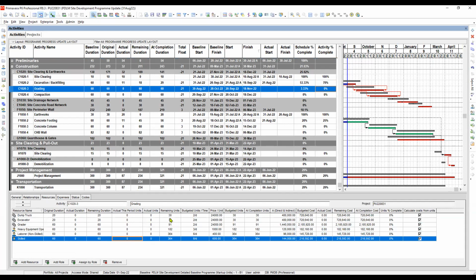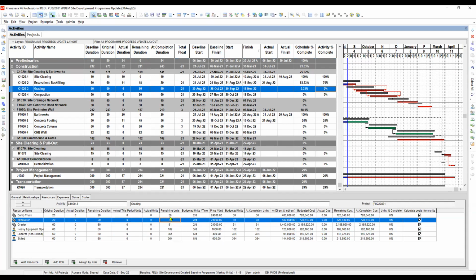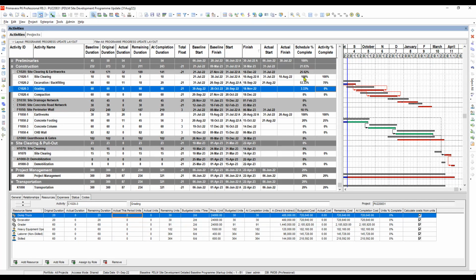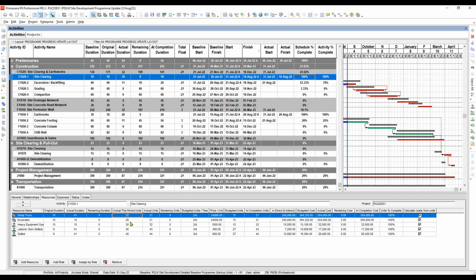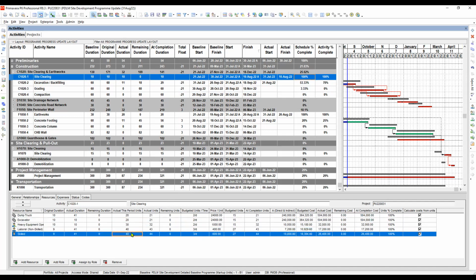So we can run the past period performance so that this period units will be stored. We have to store this period performance as usual, what we did in our previous project, so that we can also show that in our report for the past period performance.